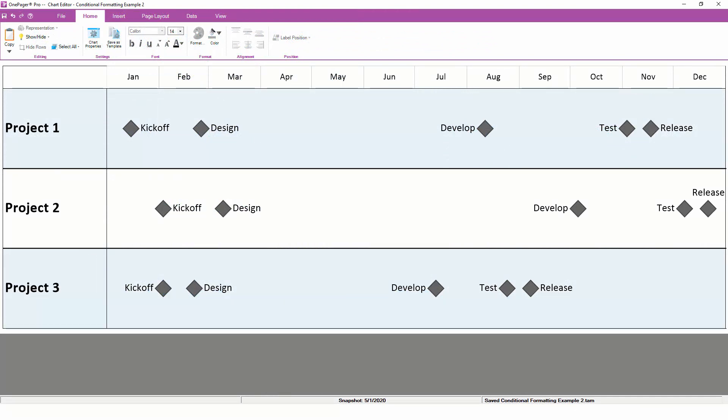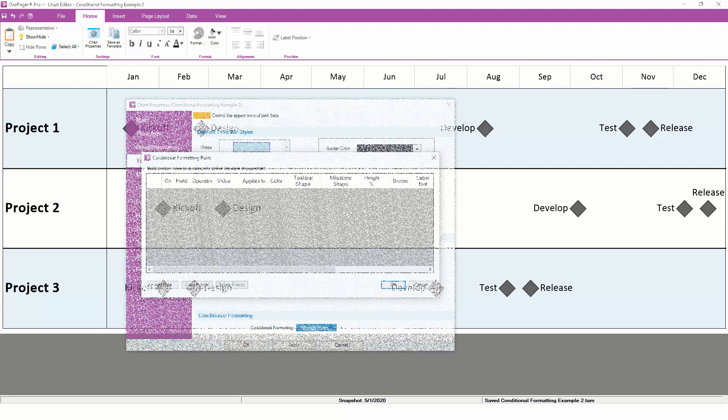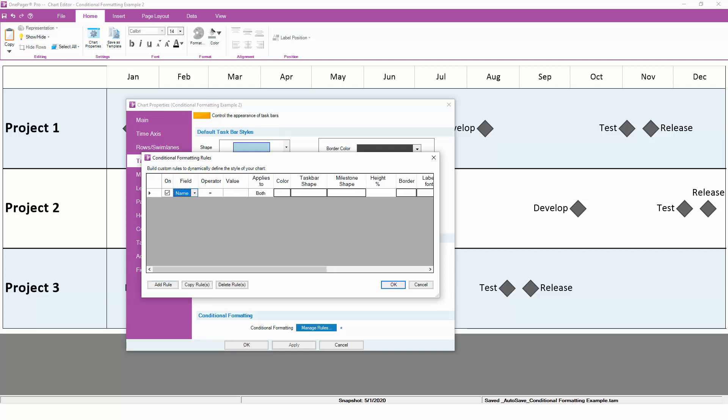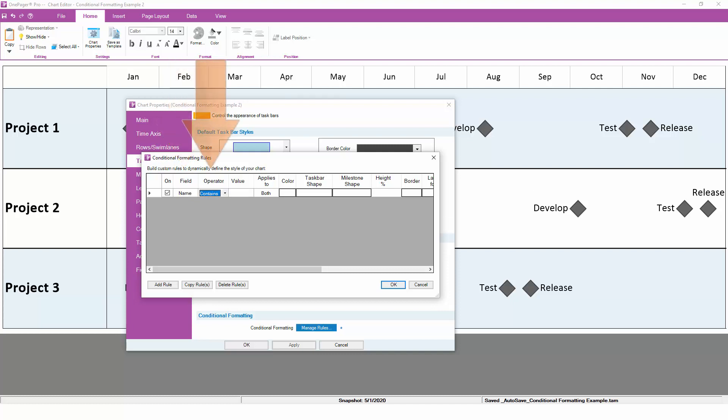Instead of taking up space repeating the same milestone names over and over, we can let conditional formatting assign a different type of milestone shape for each type of milestone. Back in the conditional formatting engine, we can create a rule that will assign a triangle shape to any milestones that contain the word kickoff.